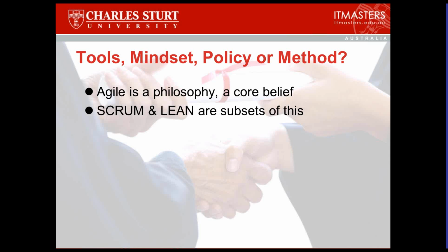So these sit on this boundary between ideas and action, between the mindset and the method, and they're a little bit of each. So when you see the method and they say, oh, yeah, but this is flexible, you could do it this way, but you could, a lot of people who are used to joining the dots can get a little uncomfortable with this idea that the methodology is flexible. What do you mean the procedure can be changed? Well, it doesn't get changed on the fly. It gets changed at specific review points and with the appropriate input of the affected parties.